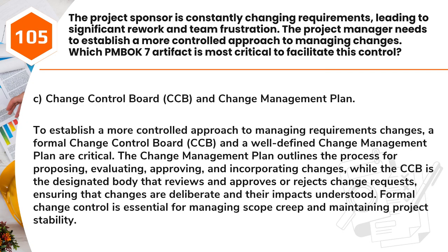Answer: C. Change Control Board, CCB, and Change Management Plan. To establish a more controlled approach to managing requirements changes, a formal Change Control Board, CCB, and a well-defined Change Management Plan are critical. The Change Management Plan outlines the process for proposing, evaluating, approving, and incorporating changes, while the CCB is the designated body that reviews and approves or rejects change requests, ensuring that changes are deliberate and their impacts understood. Formal change control is essential for managing scope creep and maintaining project stability.